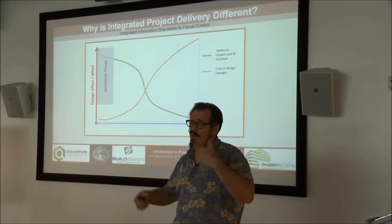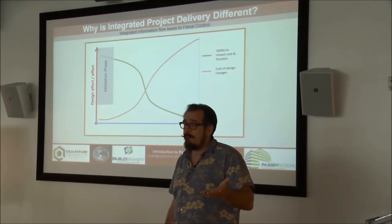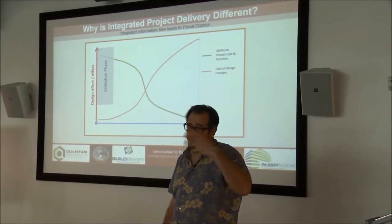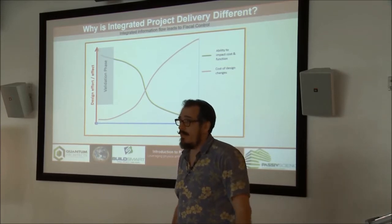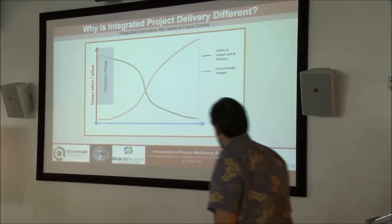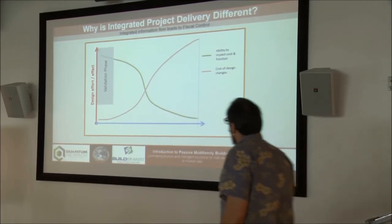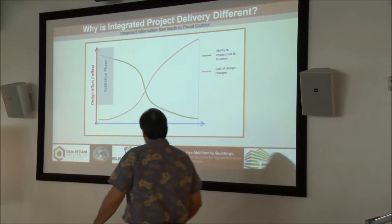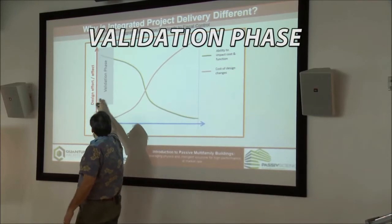Sometimes you don't. We're doing a project where we had to kick a plumber out. After three meetings, it was obvious he was not the right guy — he was really great in the interview. But what we do in relational contracting is we have this validation phase. This is where we form the group.